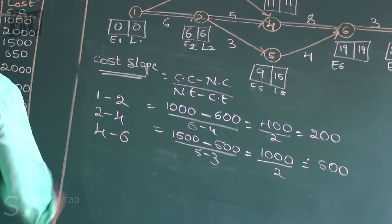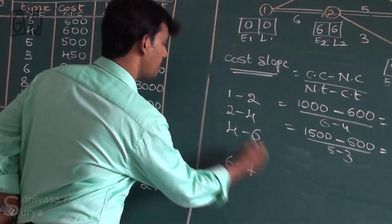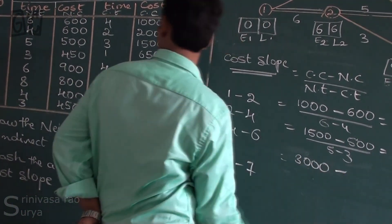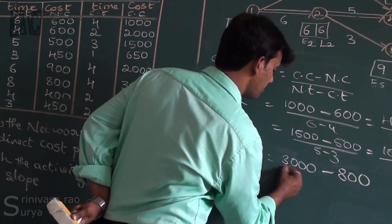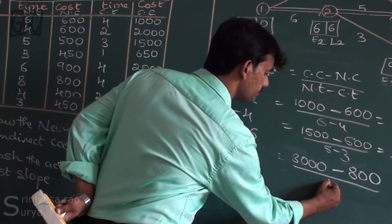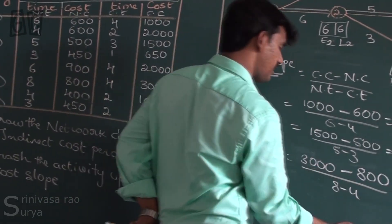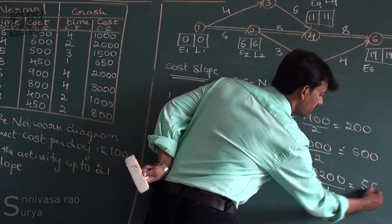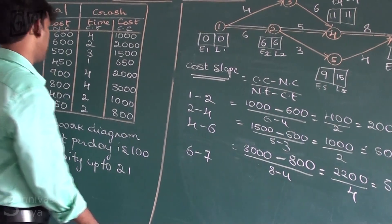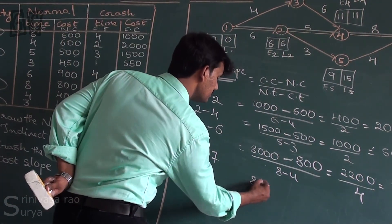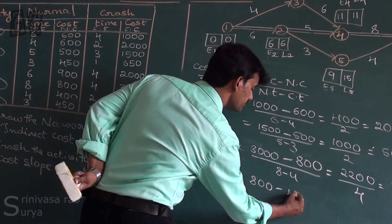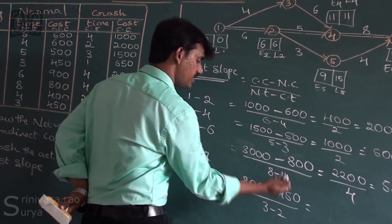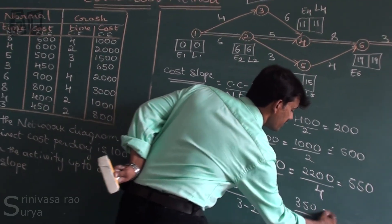For activity 4 to 6: cost slope = (3000 minus 800) divided by (8 minus 4) = 2200 divided by 4 = 550. For activity 6 to 7: cost slope = (800 minus 450) divided by (3 minus 2) = 350 divided by 1 = 350.